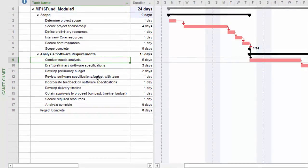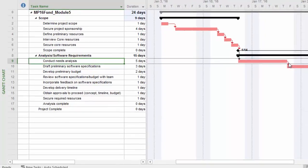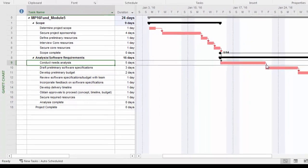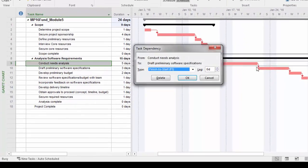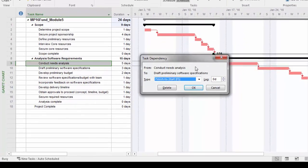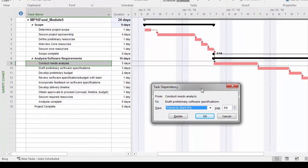Let's do that with our two tasks. I'll create an overlap between nine and ten. I'll go into that join line again, double-click right there. Lead time is going to be represented as negative lag.